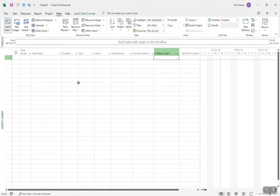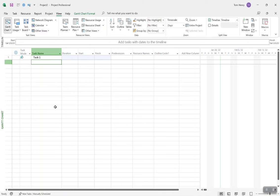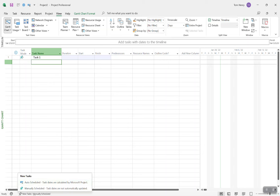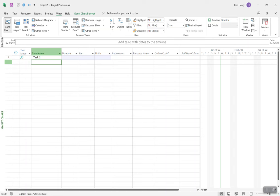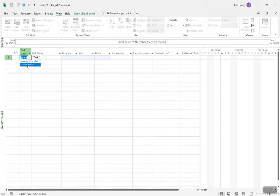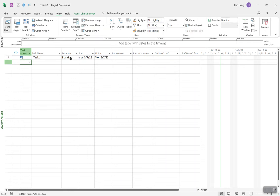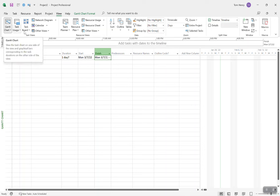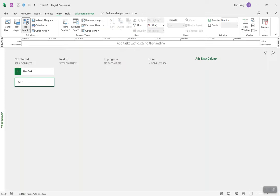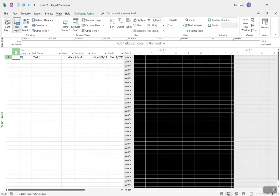If I want to see the Gantt chart view where I see all my tasks — let me put my first task in here: Task 1. I'm going to make this auto-scheduled; the default out of the box is manually scheduled, but I highly recommend you switch that to auto schedule. You can see when you do that, you get the start and finish dates. If I want to see tasks, I want to be in a task view — that section is called Task Views. There are also network diagrams, calendar views, and task boards if you're using Kanban.